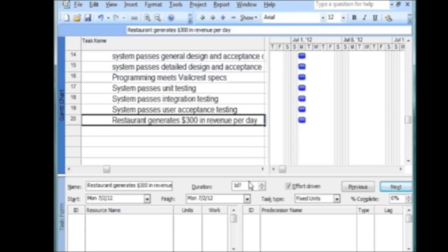Remember that we were at the sub-achievement level, so after I enter this in the software, we have to outdent this HLA twice by clicking on the left pointing arrow. We continue with the rest of the HLAs and subs until the whole plan is in.